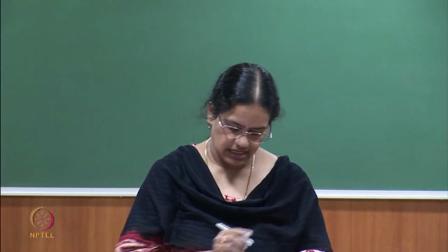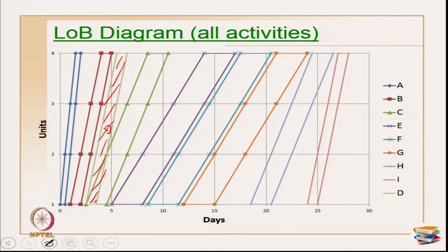Suppose there is pressure on completion and I have to finish this activity, for example, in the same example, this entire project is completing in 28 days. Suppose I have to finish all the projects on day 15 or something, if pressure on completion happens, then where should I employ multiple crews, how many crews do I have to employ, and how can I still maintain the crew continuity.